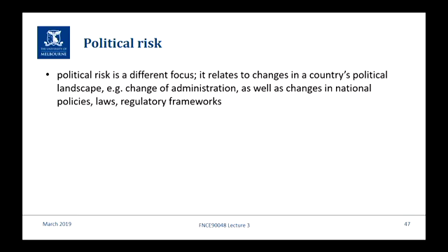We were going to get a road, it was called the East-West Link, and it was going to basically bypass the city from the east, because if anyone drives on the Eastern Freeway and gets onto Hoddle Street, the bottlenecks are horrendous. And they had to knock down a few homes in Collingwood, and there was lots and lots of political activism. And Daniel Andrews, who was opposition leader then, campaigned on the basis that if we're elected, we're going to tear up the contract. And they got elected and they tore up the contract.